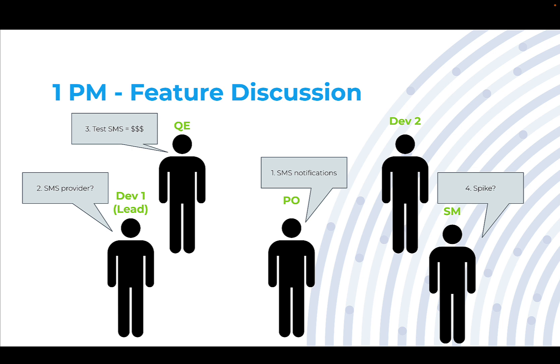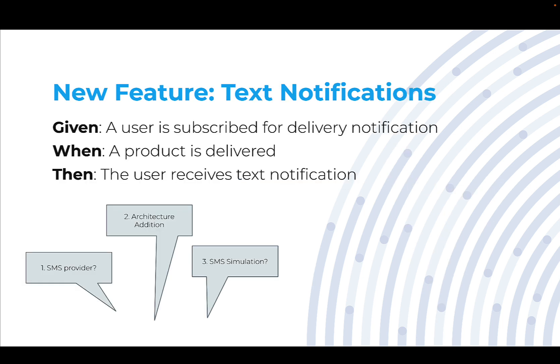The scrum master hearing this says, this sounds like a lot of work. We probably should have a spike. A spike is agile terminology for what is a research project. That's because we're going to need to do a little bit of a research project to figure out how much work is actually required.